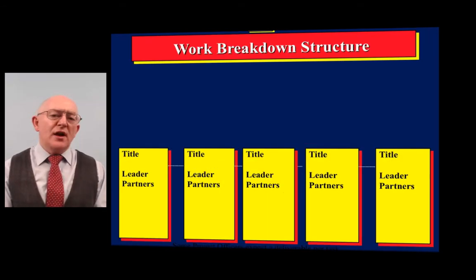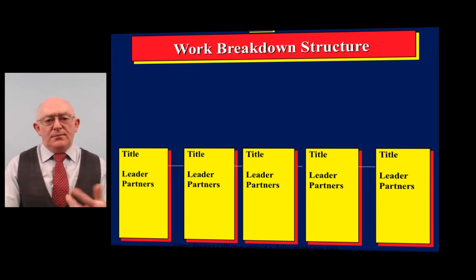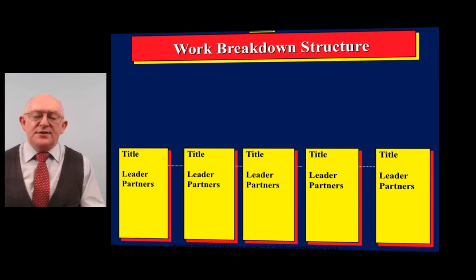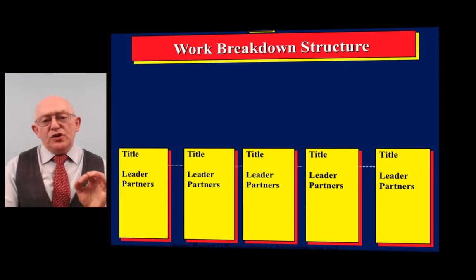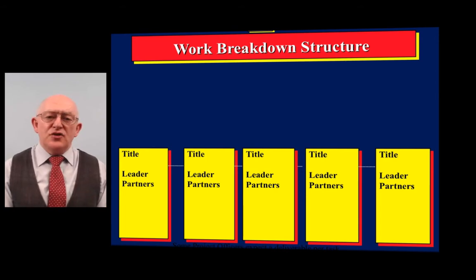Now, the next thing you do is you convert this skills matrix into something called a work breakdown structure. Now, this isn't terminology from the European Union. This is project management terminology. And take, for example, we can bring the content and the software as one work package, the network and the platform maybe as another work package. And you designate one of the partners to be in charge of each work package, and you identify which other partners from the previous diagram.